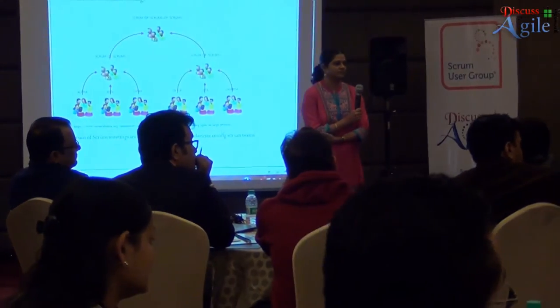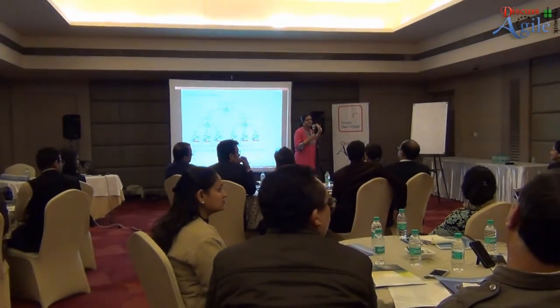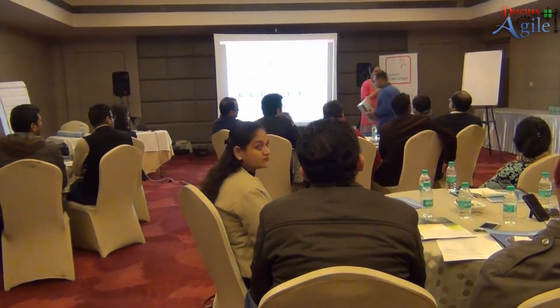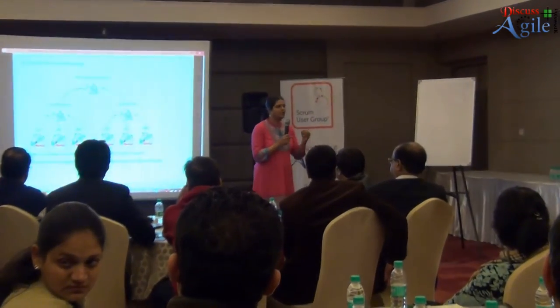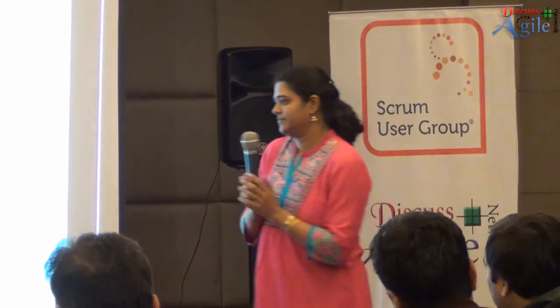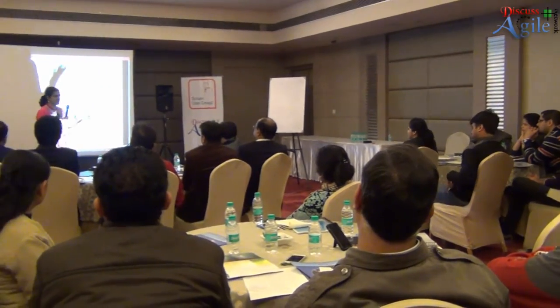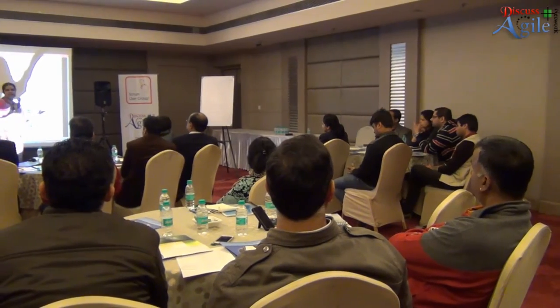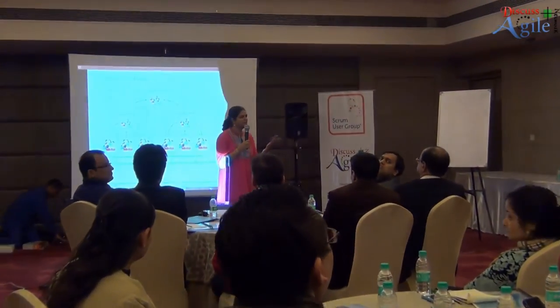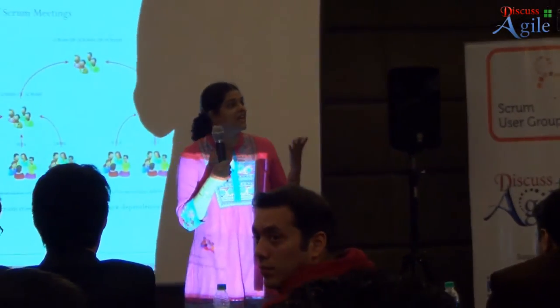The Scrum of Scrum master, or chief scrum master, plays more of a program manager role — mainly tracking dependencies rather than assigning work. This is essentially the first step of scaling Agile. Agile is meant for co-located teams of maximum nine members; when you need to scale, the first level is Scrum of Scrum with multiple scrum teams, and this can go to n number of levels.